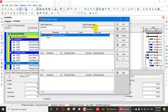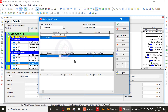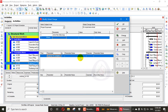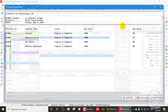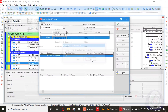The final resource global change is for expenses — named 'GC Expenses'. Go to Project Expense and set the Expense Percentage Complete to zero. Apply the change. There are four expense costs available, and they are all set to zero. Commit the change, don't save the log, and press OK.